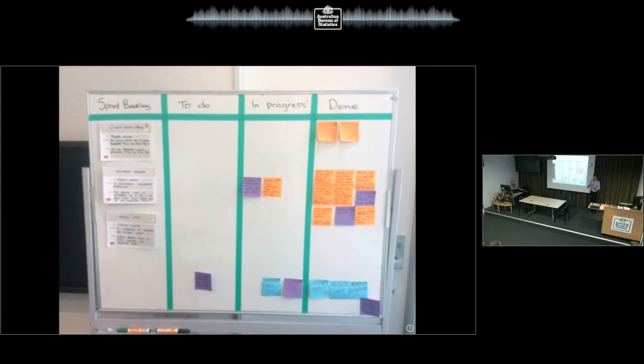So the blend of the two, which can be called Scrumban, but this is the way I often work with teams, is that they will commit half of the time, or maybe 80% of the time, to Scrum, and they will pull user stories in, but then they'll have 20% of the time where they have ad hoc work going through on a flow basis, the interrupt-based work. So they'd have a Scrum board and a Kanban board, or even one board with both.